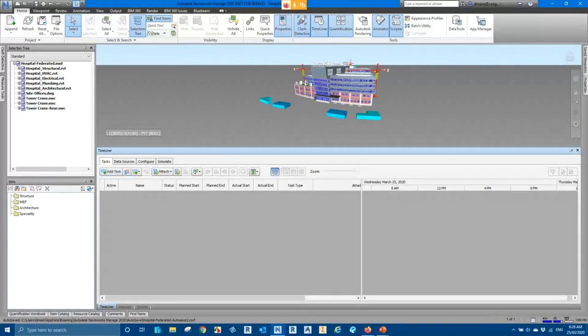Alternatively, we can create automated tasks. Automated tasks are of three types. I can create automatic tasks for every topmost layer, item, or set. Starting with item, as I mentioned earlier, if I say for every topmost item, it would then create a task for each of these files, which are treated as items in my selection tree.